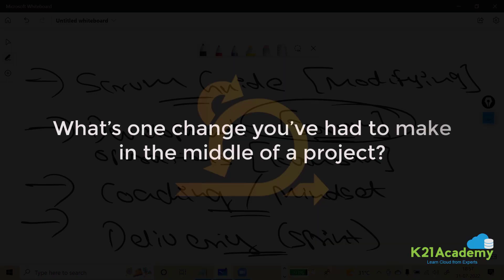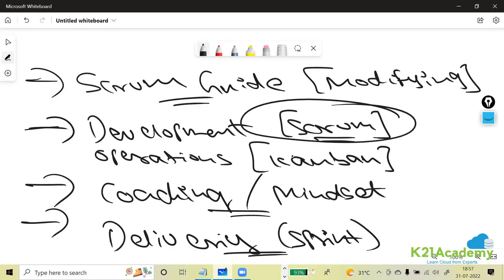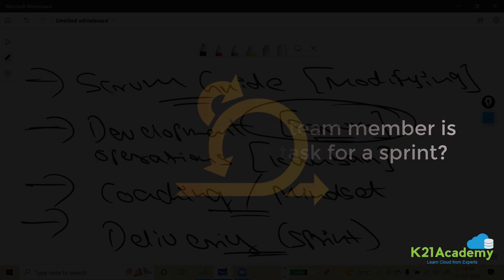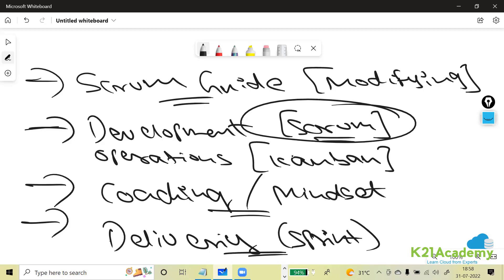What's one change you had to make in the middle of a project? We should never change anything mid-project, but if there is a high-priority item the customer needs, we must accommodate it. If a team member is unable to complete a task for a sprint, first understand what happened — was there a requirement change, was the member unavailable due to sick leave or other work? Then discuss it in retrospective to ensure the team member won't be occupied with external distractions in the future.